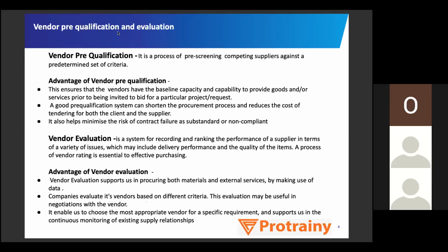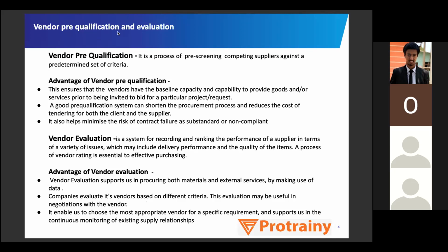I get to know about the vendors at an earlier stage. I have already set a baseline. I already have a set of vendors in my hand, and this also minimizes the risk of failure, substandard material, or non-compliance with the standards which we have to follow. In general, in the construction industry everything is done according to some IS standard or some ASTM code, or standard guidelines. Those guidelines or standards we already check with vendors, and if those vendors qualify, we consider them for our whole project.